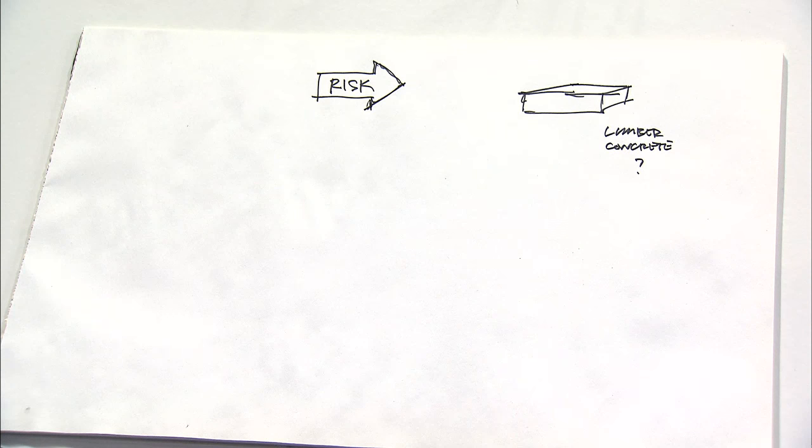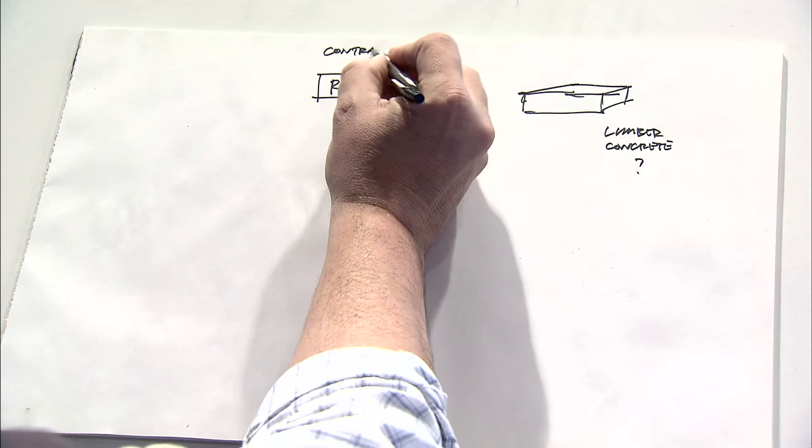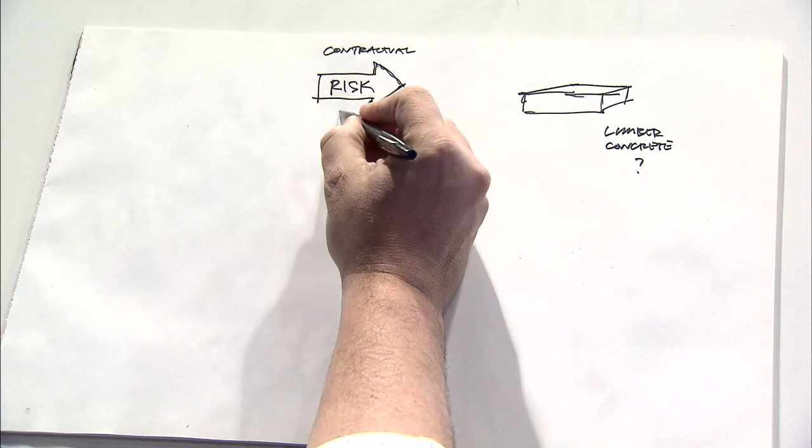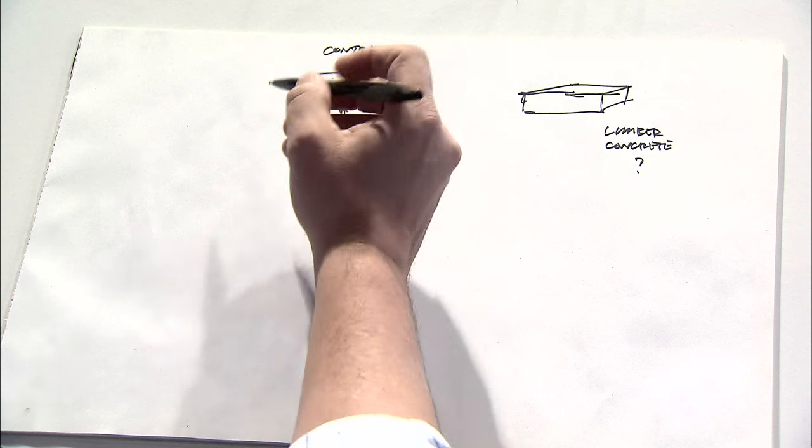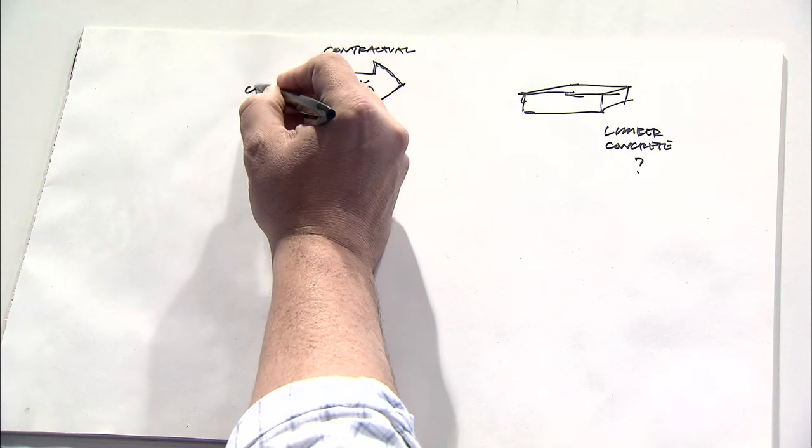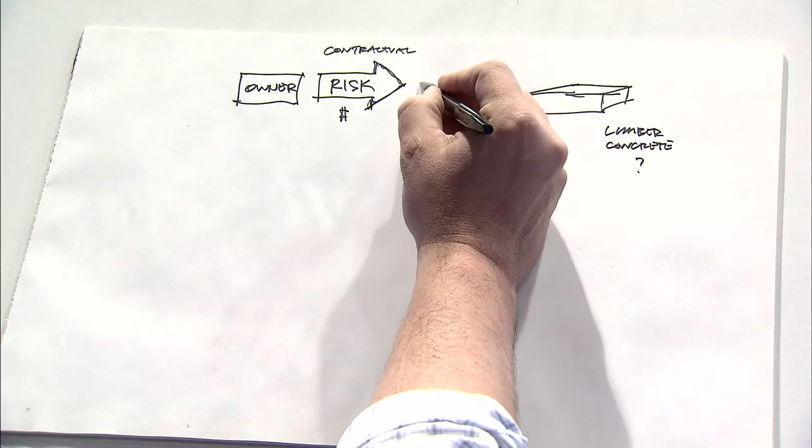But a lot of the risk that gets transferred in construction is contractual and is more of a function of money or cash flow or things on a much larger scale that happen associated with a project. And one of the most common transfers of risk is when the owner of a project seeks to transfer the risk of construction to a general contractor.